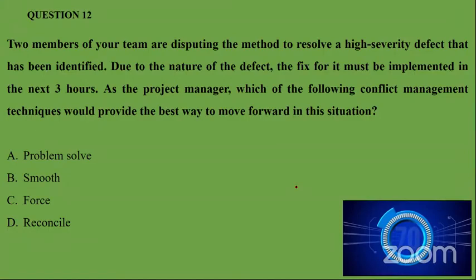So smoothie is not a conflict management technique. So we have three options limited now: problem solve, force, and reconcile. Normally force is also not considered a good option because as a servant leader, this is not effective. So now we have limited to two options, which is problem solve and reconcile. So going back to the question, two members of your team are disputing the method to resolve a high severity defect that has been identified. Due to the nature of the defect, the fix for it must be implemented in the next 3 hours. As the project manager, provide the best way to move forward in this situation.